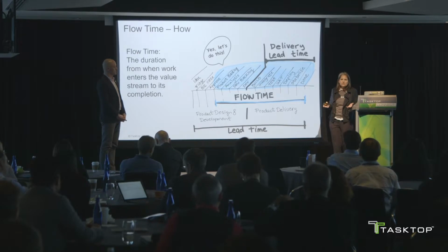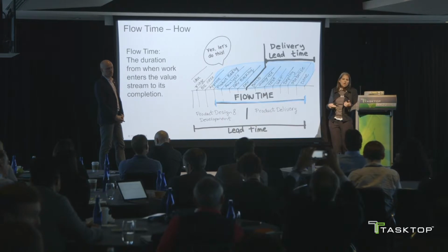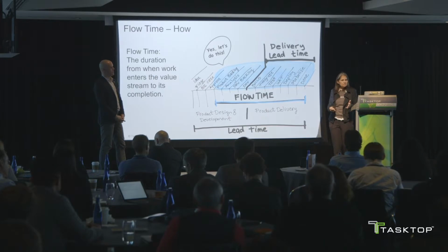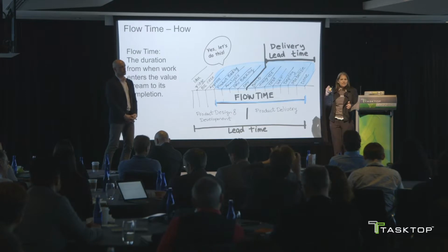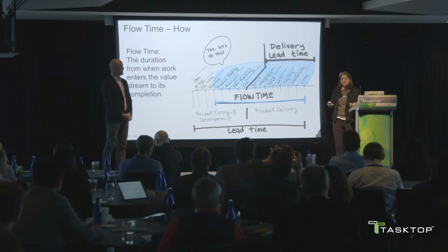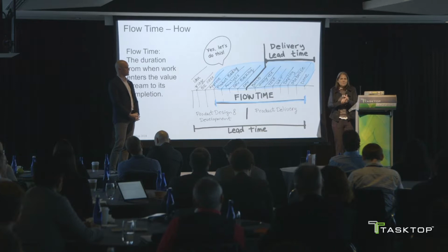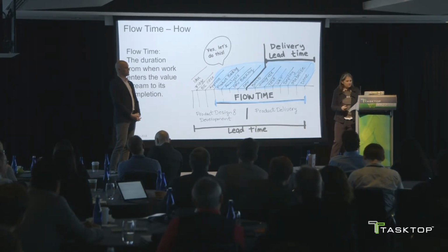Because not everybody wants to start the clock when a customer made a request. And frequently, people would come back and say, in our context, it makes sense to start the clock when we decided that we're actually going to do something. And we don't really care if we're not going to do it. But from the time we decided that we're going to do something, from when product management or product owners said, yes, let's do this, let's start the clock ticking and end it when it is done. And done is up for debate too. Some customers want it to be passed when something's delivered to see how much business value they've derived from it.